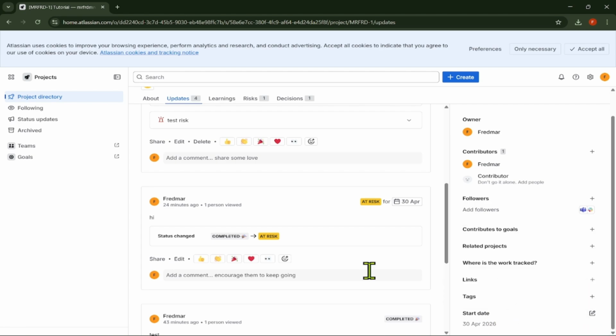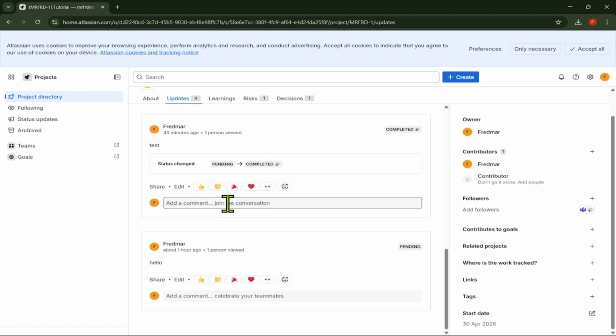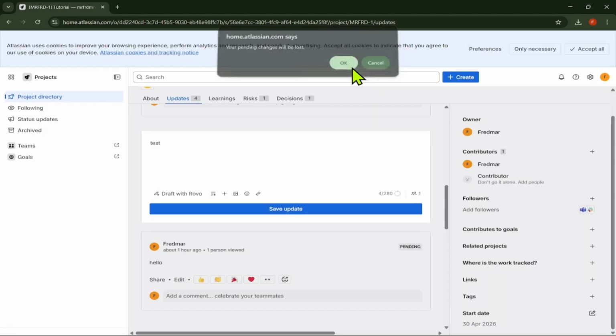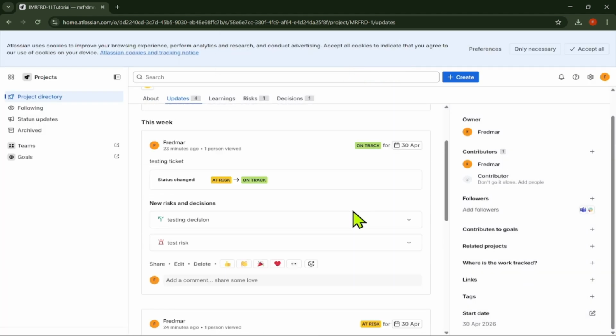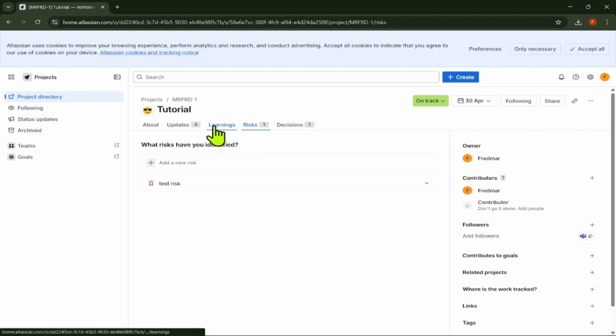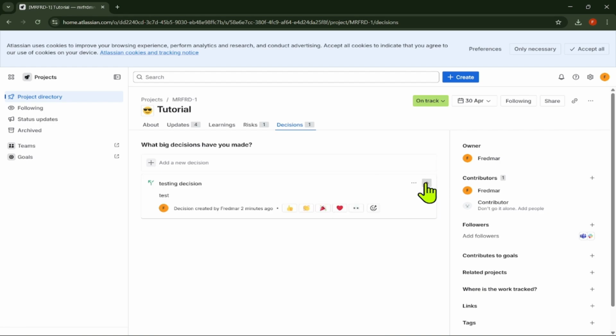You can drag items on the timeline to adjust their schedule. You can also expand or collapse epics to see the work inside them. If you want to focus on specific work, use filters. You can filter by assignee, status, issue type, or other project fields. This makes it easier to see only the items that matter to your planning.